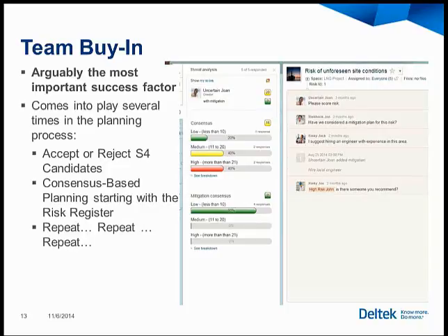I want to mitigate it by putting it out on the table, having people vote, like you can see on this voting screen here, as to which items have the highest likelihood of occurring, and then the most impact if they do occur, and then we're going to mitigate. And then next month, once we've mitigated the first set, I'm going to say, hey folks, what's going to hurt us this month? Which are the most important ones? Which are the most likely ones for where we are right now? And how do we mitigate them? So we're going to rinse and repeat every single month, both during the baseline phase and then throughout program execution as well. We're going to vote here down the center, and then we're going to discuss it here on the right.